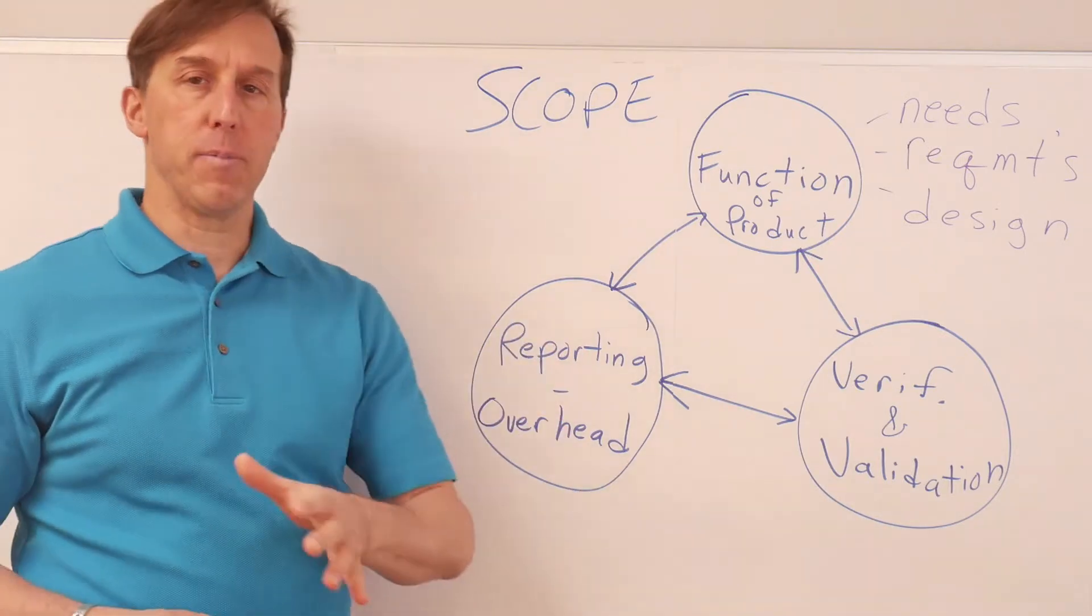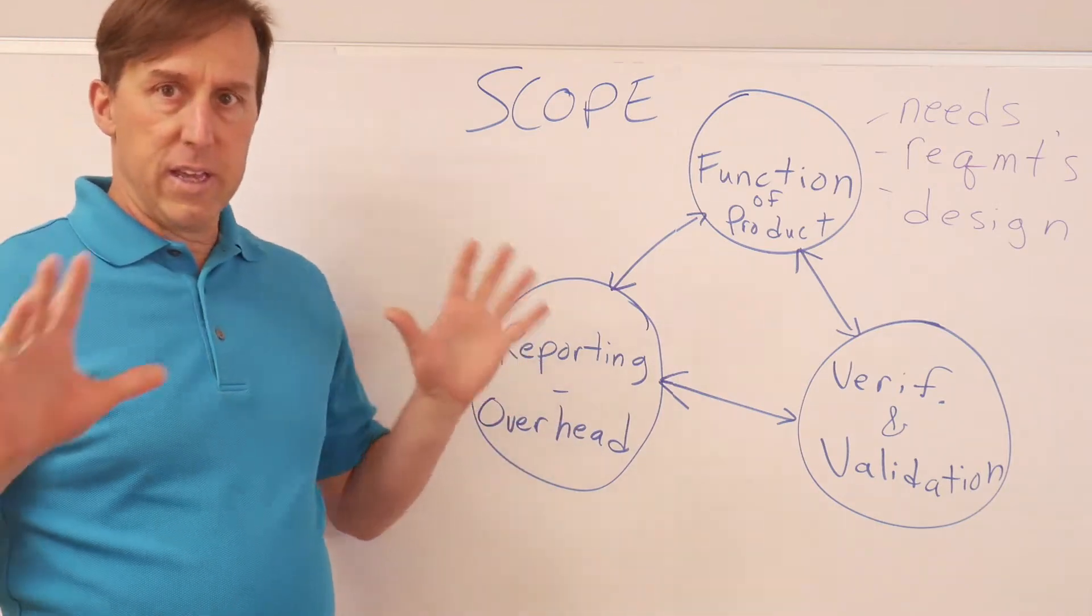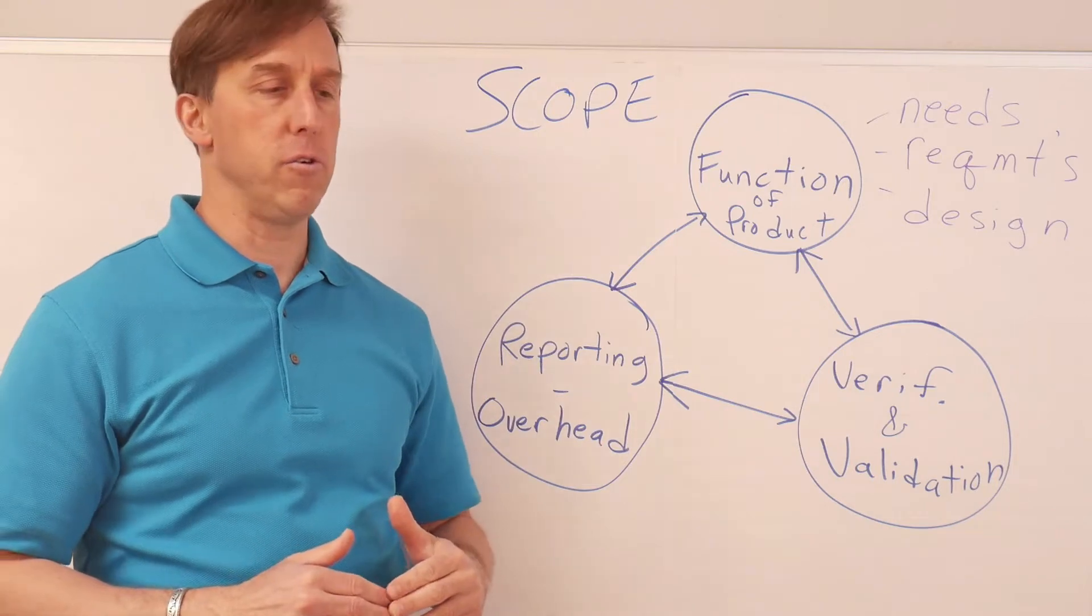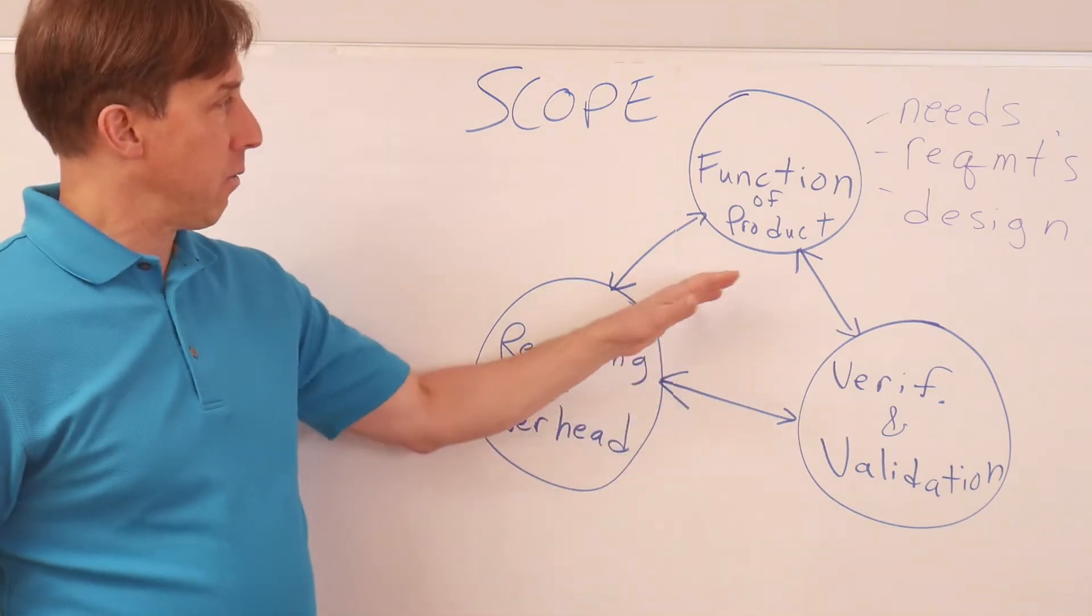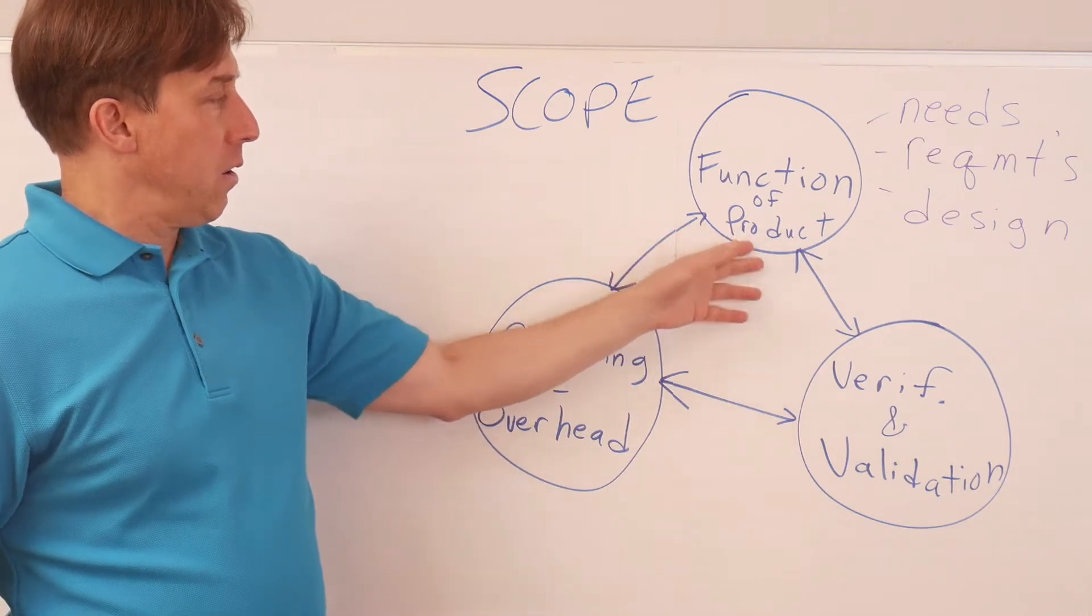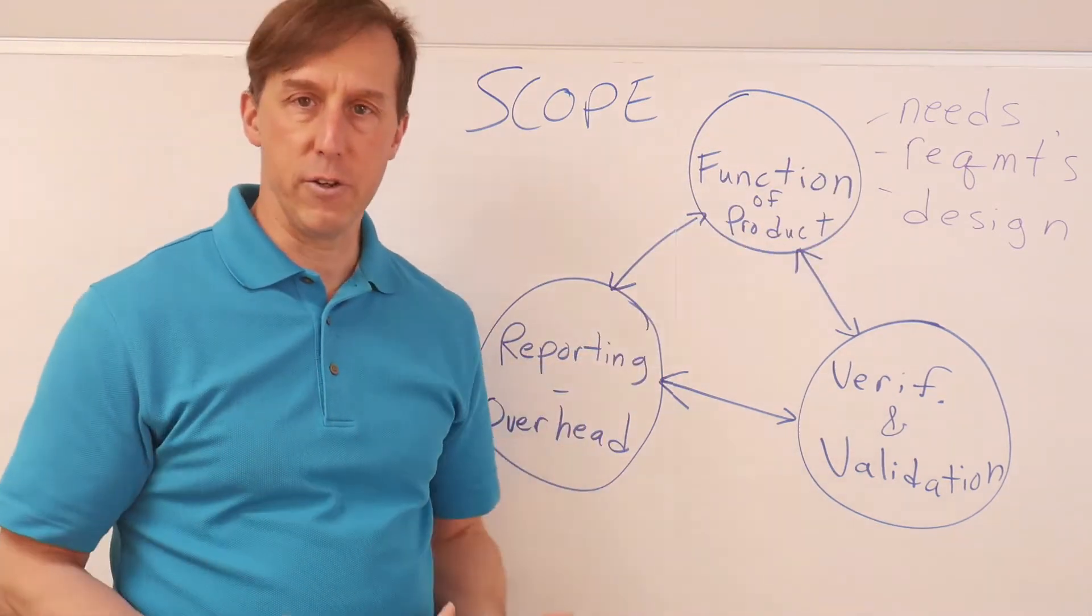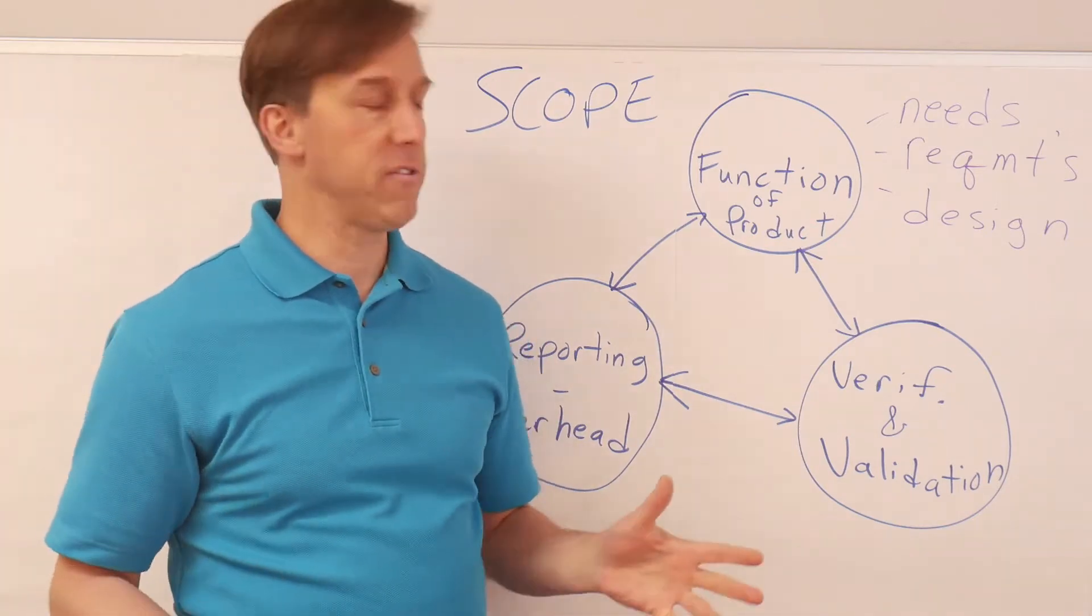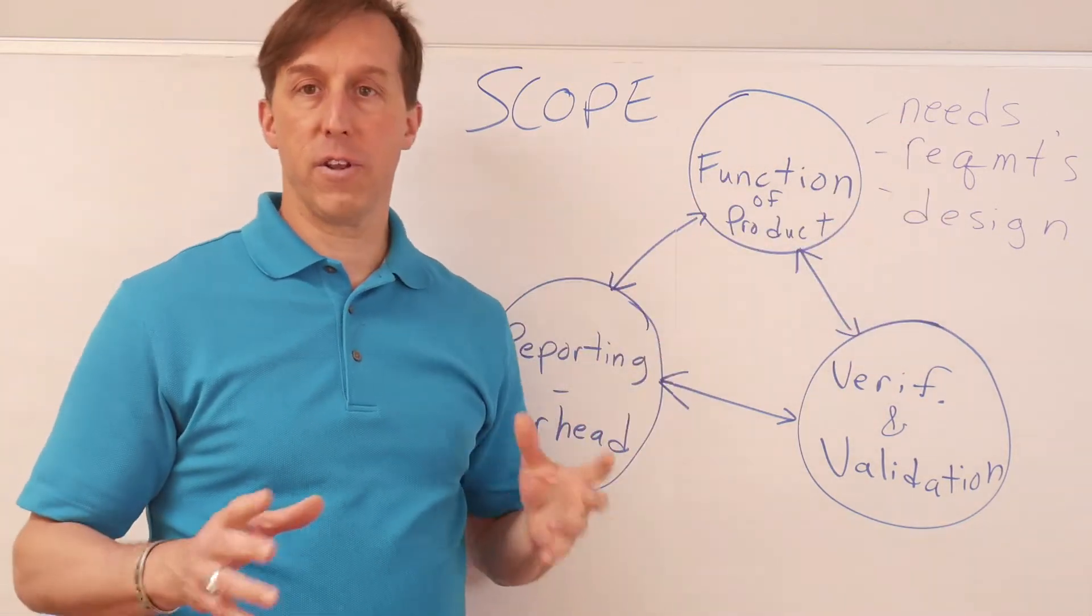Now, one thing that may help you is to break scope into three different sessions. We're going to talk about a larger project, but this can scale down into smaller tasks and even your individual work. If you start with the function of a product, so what does it need to do? What functions does it have? What are the requirements? You can also say, what needs does it satisfy? So you've got needs, requirements, and then the design.